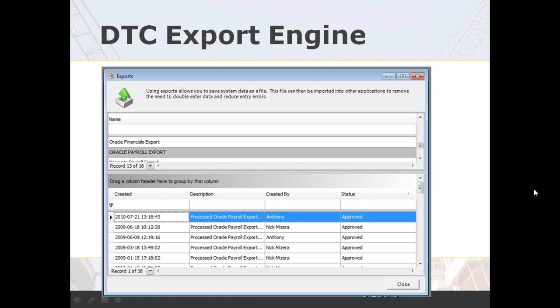So again, on the import process and the export process, you might have 10 different Primavera export processes depending on the business rules for your division or for that job. And a lot of that's going to be dictated by what the owner would like to see at the end of the day. For small jobs, maybe you want hours to come over daily. For larger jobs, maybe you just want them to come over weekly. Those can all be defined by the integration processes we put in place. And again, probably beating a dead horse here, but they can be different by project or division.